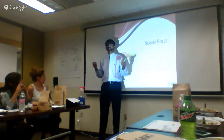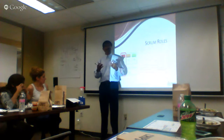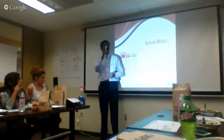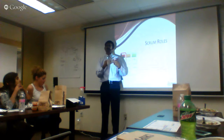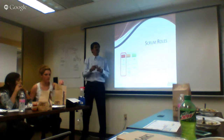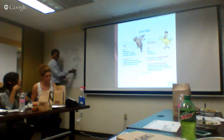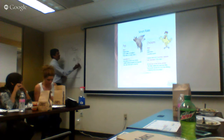Users see the system for the first time, so the users have comments. The product owner has comments. They say, okay, you should have done this instead of this. That's not what I asked. I was asking for something different. So they take all these changes and add them into the product backlog to work on in a future sprint. That is the inspection and adaptation for the sake of the product. The earlier one was for the sake of the sprint. This is for the product. And then they say, okay, off you go.